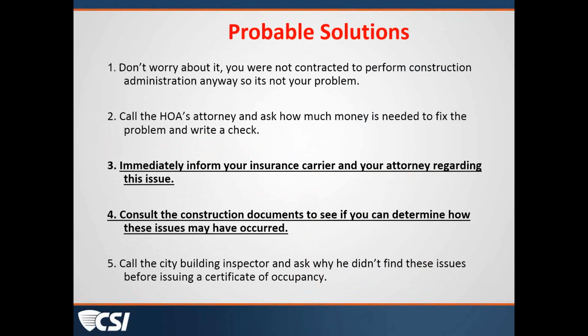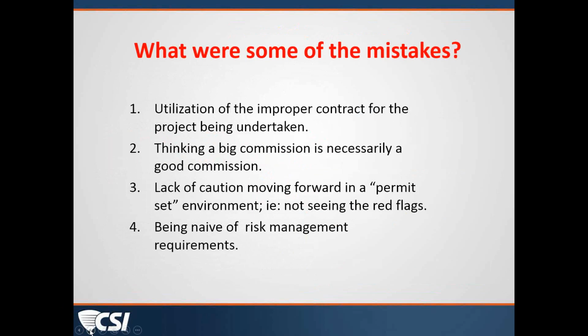Matthew, let's go to the next slide and talk about some of the mistakes, and that may prompt some comments as we talk here. One of the glaring errors is in the very beginning: going to standard AIA contracts, for example, or any other standard form of contract, whether it's interior designers or ConsensusDocs or CSI documents, ABC, home builders, whatever they are. Using the improper contract sets this domino effect in motion right from the start. Please don't take that as a suggestion that you should write your own contracts, but certainly you wouldn't use a standard form if you weren't going to provide typical services that would include construction administration.